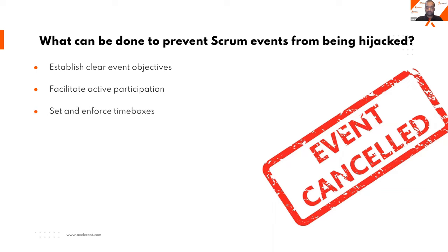But make sure these are time boxed. These have limited time, because if you give too much time, they will have less bandwidth to work and they will start skipping. So if you time box your events, it will also make sure that people are joining these events. Just an example, if your DSM is always taking 1 hour, or half an hour, then people will think 1 hour given to DSM is too much. But if you time box it to just 15 minutes, people will think, okay, a 15 minute meeting, every one of us can easily join it.